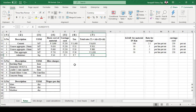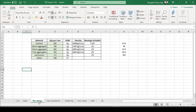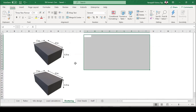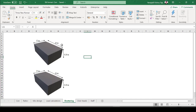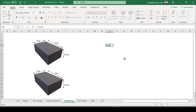Now let's start making the rate analysis. We have the quantities of materials required to prepare one cubic meter of mix. We are going to cast two concrete foundations with dimensions 15 meters by 20 meters by 0.2 meters. The quantity of concrete is equal to 15 into 20 into 0.2 into 2. Unit of measurement is very important in this analysis.